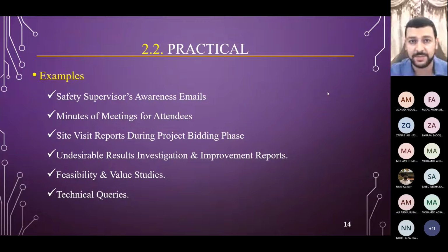We always compose a specific standardized document, which is called minutes of meeting, where we state who are the attendees, for example, Mr. Ahmad, Mr. Muhammad, Mr. Ali, and what are their positions, electrical, mechanical, civil, and then each and every topic with their respective tasks. Civil, we need to follow up on this, we need to pour concrete on this, we need to fix this. Electrical people buying, for example, lights, buying cables, coppers, mechanical fixing their drinking water lines.